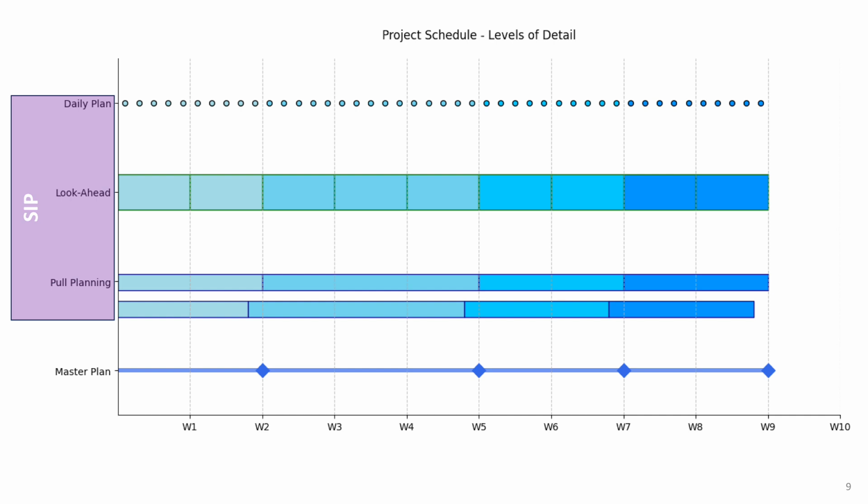This illustrates the connection between different types of schedules. The master plan shows the key phases and major milestones. Well before each key milestone, a pull planning session is organized to develop a sequence of tasks from now until that milestone. If time is tight, decisions about stacking activities in parallel or accelerating work are made at this stage when creating each pull planning schedule.